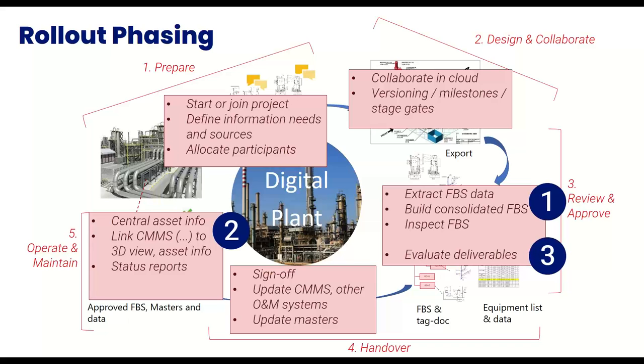With that, we can start validating that data. For instance, if the requirement in the CMS is that every space or every asset should be classified with the OmniClass classification, then we can inspect that the data we get is indeed from the OmniClass classification. So we evaluate those deliverables to make sure that they will serve the asset management processes later on.